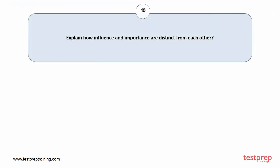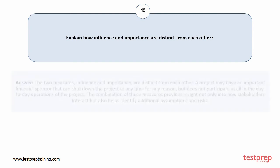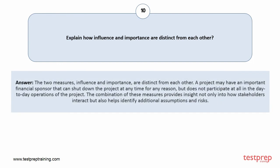Question number 10: Explain how influence and importance are distinct from each other. Your answer is: The two measures, influence and importance, are distinct from each other. A project may have an important financial sponsor that can shut down the project at any time for any reason, but does not participate at all in the day-to-day operations of the project. The combination of these measures provides insight not only into how stakeholders interact, but also helps identify additional assumptions and risks.